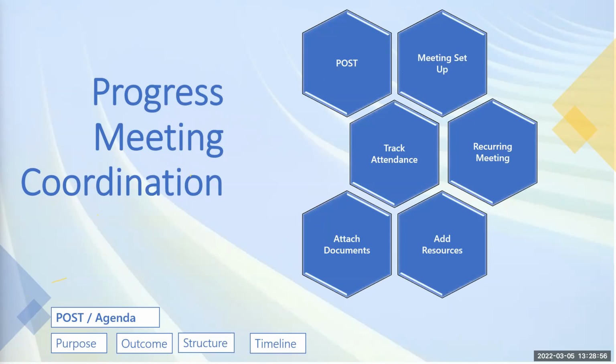If you have a change approval board, for example, before decisions are made, certain key people in key positions have to be there. And if they're not going to be there and they haven't got a delegated person to represent them, as Mary said, the meeting most likely wouldn't go ahead because you're not quorate, you can't make decisions. Now, those are regular governance meetings, but for everyday meetings, i.e., I need to discuss an issue with Mary and yourself, those are not governance meetings. They're meetings you have as part of progressing the project.